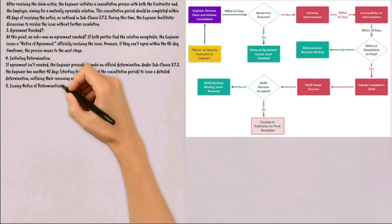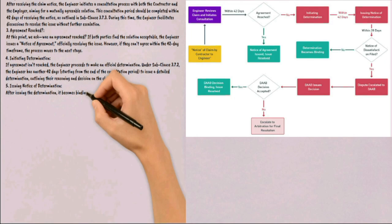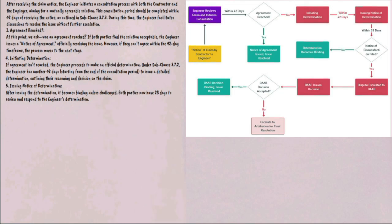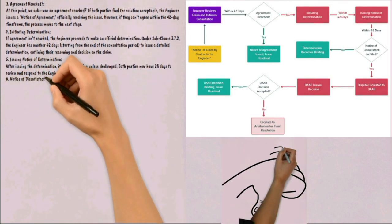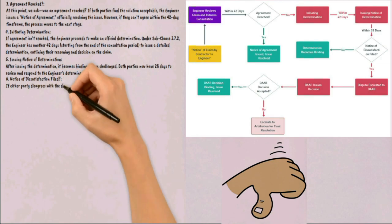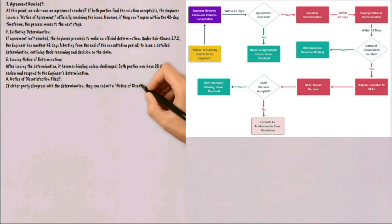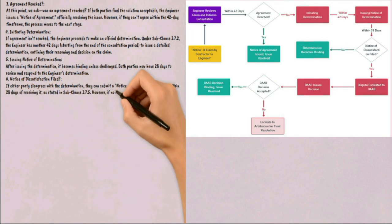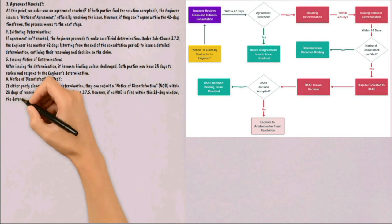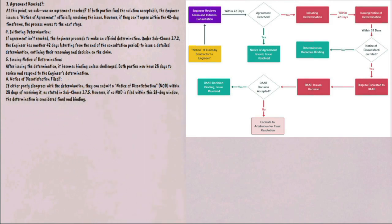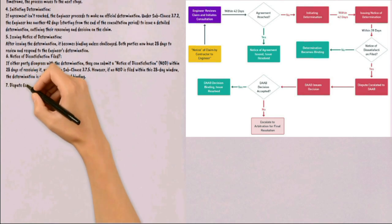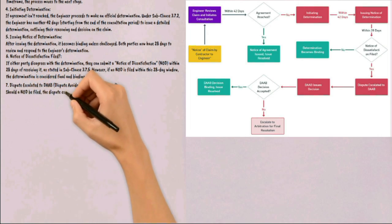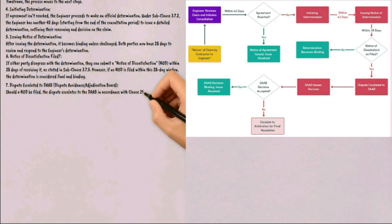Step 5: Issuing Notice of Determination — after issuing the determination, it becomes binding unless challenged. Both parties now have 28 days to review and respond to the engineer's determination. Step 6: Notice of Dissatisfaction Filed — if either party disagrees with the determination, they can submit a Notice of Dissatisfaction within 28 days of receiving it, as stated in Sub-clause 3.7.5. However, if no Notice of Dissatisfaction is filed within this 28-day window, the determination is considered final and binding. Step 7: Dispute Escalated to DAB — should a Notice of Dissatisfaction be filed, the dispute escalates to the Dispute Avoidance Adjudication Board in accordance with Clause 21.4, which then reviews the case and issues a binding decision.